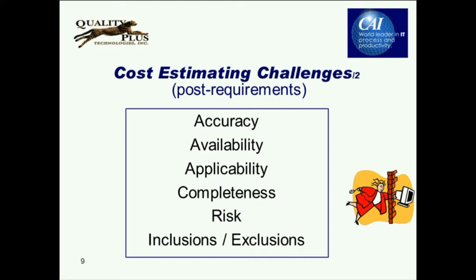Whose time is included? Do we include the programmer's time? Of course we'd include programmer's time, but what about the contracted staff? I've been in places where the cost estimates only include contracted people. So that means if you've got internal teams, they don't include that in the cost estimate at all. And if I use that basis for a future estimate, is it really going to be reliable? If I don't know what's included or excluded in previous projects, and I don't know what will be excluded or included in this project, how can I do a good estimate?